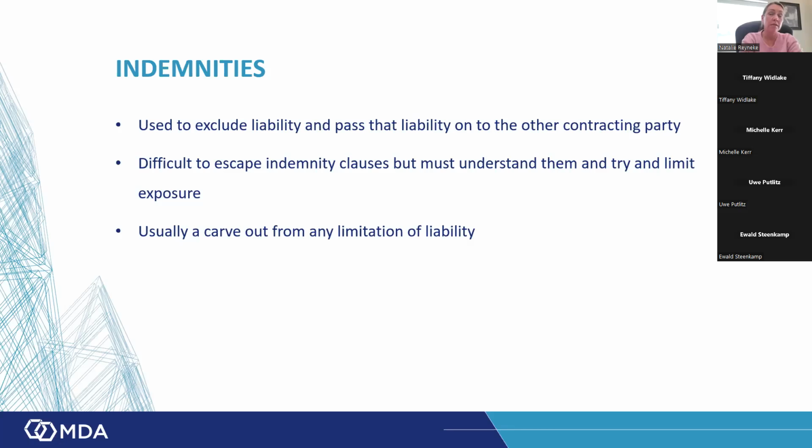Remember that as the contracting entity or the tendering entity, you have the ability to investigate, to see the site, to do those kind of things. And generally you need to take into consideration the area where it is, the surrounding communities. You know that as a prudent contractor, and if both the employers and the contractors keep quiet, it's a recipe for disaster. So if you receive a tender document, that's something that you would have to qualify.